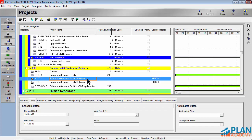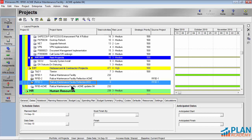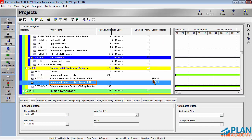What I want to do is just differentiate these. So this goes to my ACME subcontractor and this goes to BSO. Those are my two subcontractors. Now, one thing I want you to notice here is that when I create a reflection project, there's a field here called source project. And you'll notice that the source project essentially is a pointer back to the original project plan.